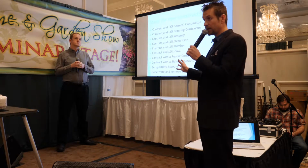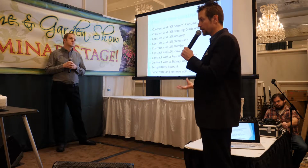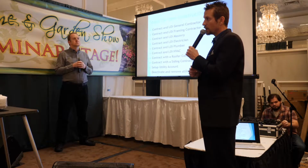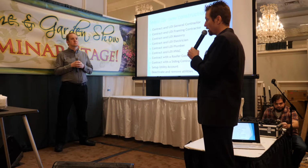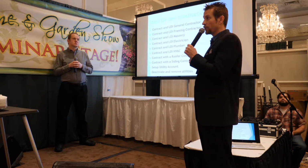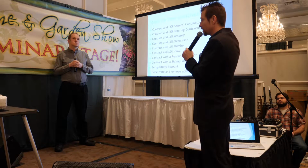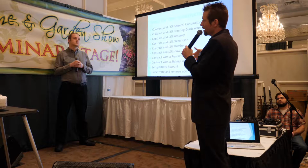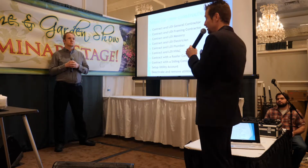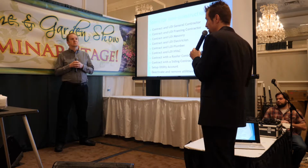You're going to want to set up a utility account, because what you're going to be doing is removing electricity, removing the actual water that's coming to the property if you're demoing it. So you actually need to set up an account before you can remove the utilities. And again, this is something you want to do early on in the process, because we've talked to homeowners and it's taken them over 2 years to build a house. It's because they're not contacting ComEd far enough in advance, so ComEd might be behind to deactivate and disconnect your service. And that has to be done before the house can be demoed.